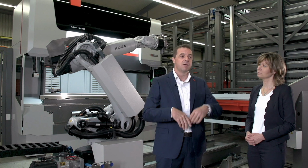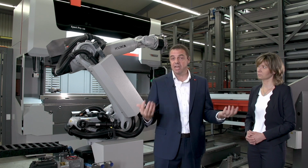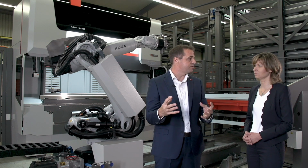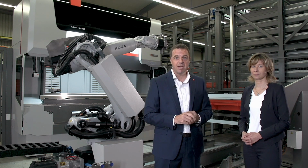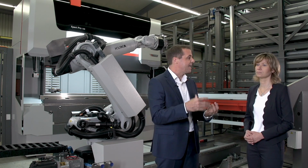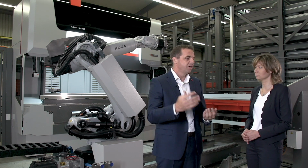We are defining material and data flow. Then we move on into the preparation phase, where we finalize, for example, the layouts. Then we move on to the realization phase, where the different machines and subsystems get delivered to the customer site. Then in the commissioning phase, everything is glued together to realize the data and material flow we have agreed on together with the customer. And then the go-live phase starts, where we are still on site and support our customers during the go-live phase.